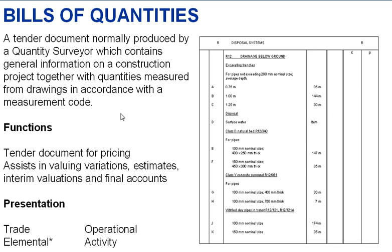But what does a Bill of Quantities do for us? It's a tender document for pricing. When prepared by the professional quantity surveyor, the estimator will price it on behalf of the contractor. These agreed rates become contractual rates and they assist in valuing variations, preparing estimates for additional works, preparing interim or stage payment valuations so the contractor can be paid, and for preparing the final account when the works are complete.